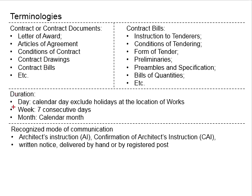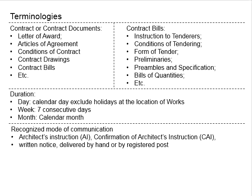Next, we talk about the week. A week refers to 7 consecutive days, regardless of public holidays. In our general perception, 7 days is equivalent to a week. However, in the context of the contract, based on the definitions in the conditions of contract, this is not necessarily true — because 7 days excludes holidays. In the case that there are holidays within that 7-day period, a week by definition is shorter than 7 days, since a week means 7 consecutive days.